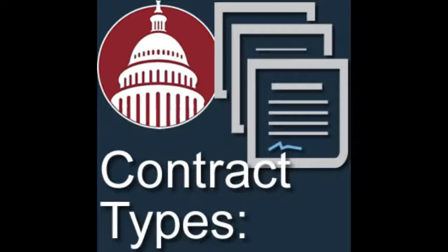So before we wrap it up, we should cover one more thing that's obvious to us as former contracting officers, but maybe not obvious to industry or to fairly new contracting officers. So go, Kevin. So the concept of cost plus a percentage of cost is not allowable. And for those of you who want to follow along in the FAR, this is 16.102(c).